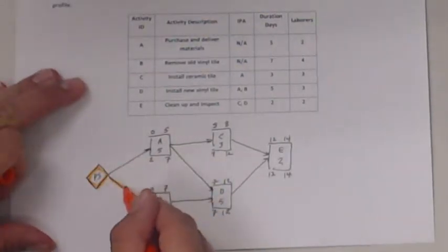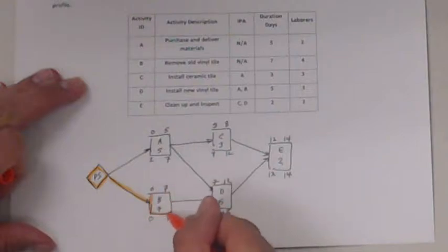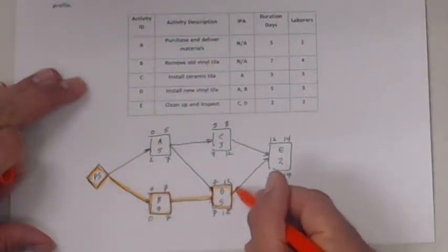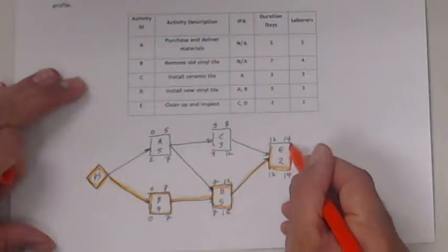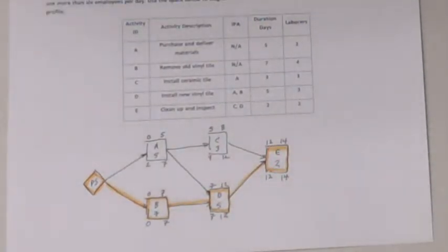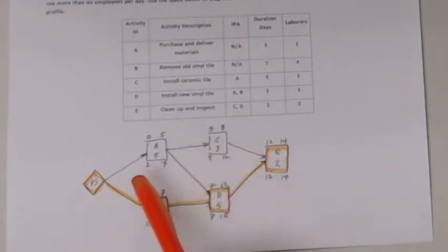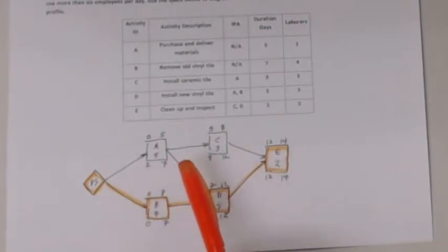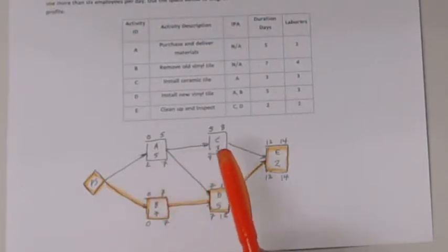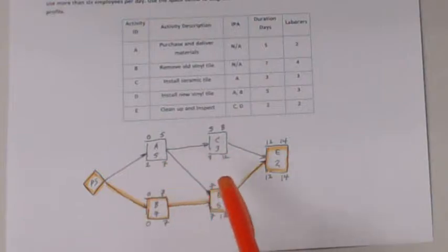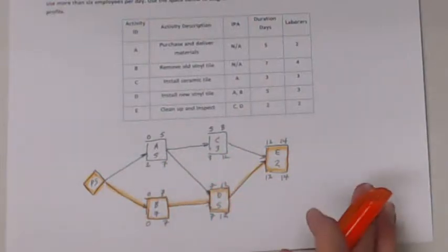Obviously, project starts critical, activity B, activity D, and activity E are all critical. So that's the first step in leveling resources. And what we will try to do is, in order to preserve resources, if that 6 laborer constraint comes into play, we're going to have to figure out something to play with these two activities, see if we can't maneuver those around a little bit.